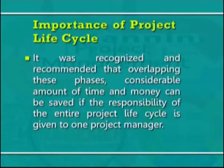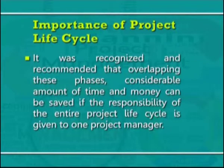As the project manager discipline matured today, it was recognized and recommended that by overlapping these phases, a considerable amount of time and money can be saved if the responsibility of the entire project life cycle is given to one project manager. When implemented, this led to fast tracking processing in the engineering, procurement, construction categories of projects as well as in many other project categories. This led to the development and use today of a number of project life cycle processes, models consisting of phases or stages.